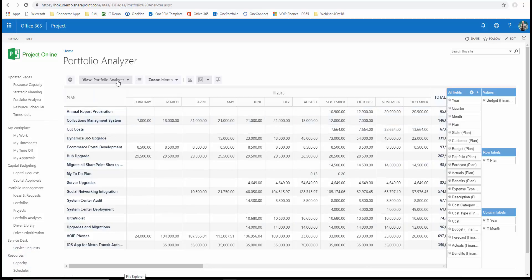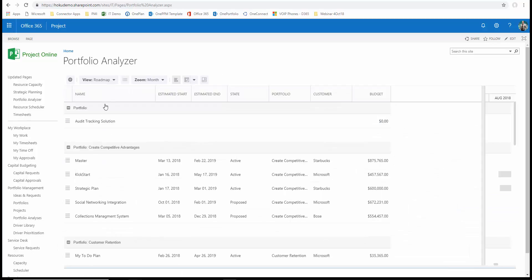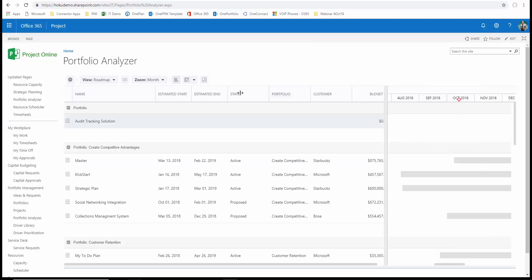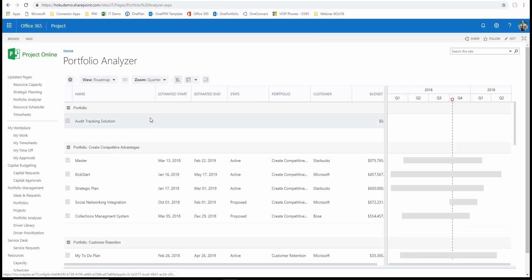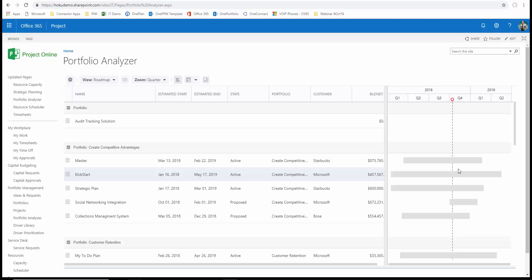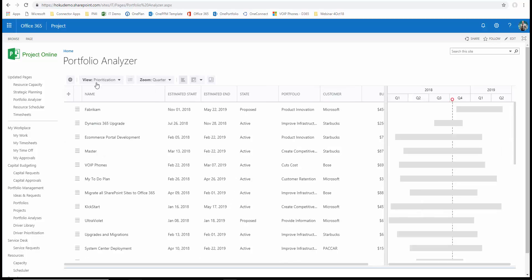And then also there's a roadmap capability where we can take a look at the individual portfolios, look at this from a timeline perspective and zoom out and look at it in different ways. If I want to look at a quarterly view and get a bigger horizon, I can do that and do some very easy portfolio analysis. Now what's really nice, even though Project Online has its own portfolio analysis capability with more of the advanced pairwise comparison capabilities, we can do prioritization here with more simplified drag and drop and ranking of projects. We can have fields of data that has forced rankings or scoring in here.